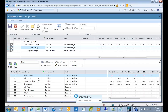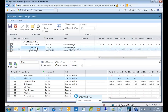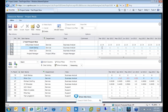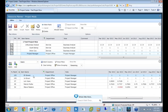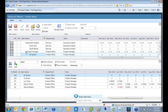Scott Bishop is now over-allocated because he's doing the work of two people. We can see the original requirement was two and there's zero remaining, but we over-allocated him — so we need to fix that. Brian Cox is mostly available in these months, so I can drag and drop him onto Scott Bishop. It asks whether I want to split the work or replace, and I want to split it to resolve the over-allocation. Now Scott's doing one FTE of the work and Brian's doing the other. You can see how easily you can build out this plan. Now I can look for my project manager — click on that, hit match, do the same thing, and say fulfill.